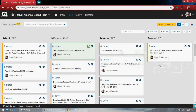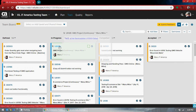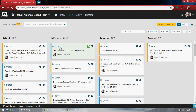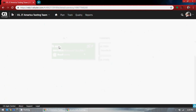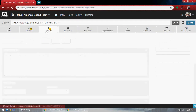Why is it not moving? I can assume why it's not moving: because there are defects which are not closed. If there are defects which are not closed, you cannot say it is completed. Let's find out — user story 149, let's go here. Two defects.